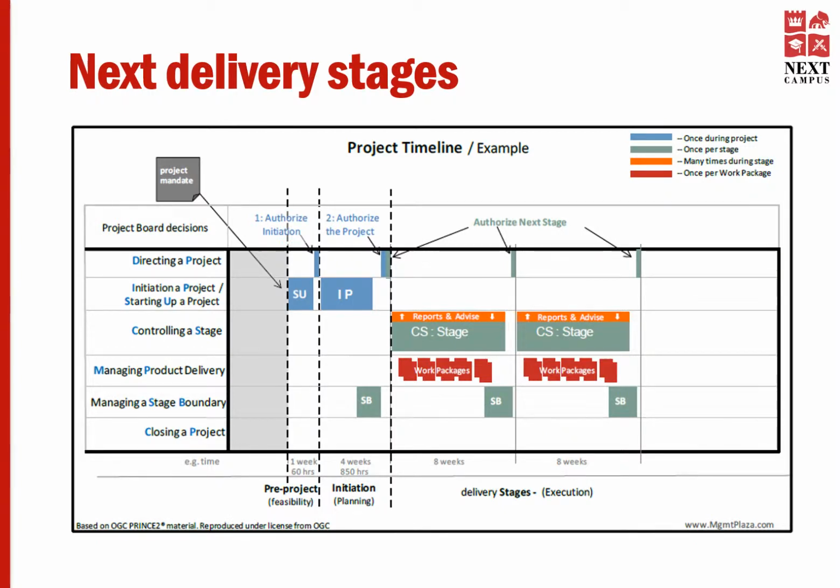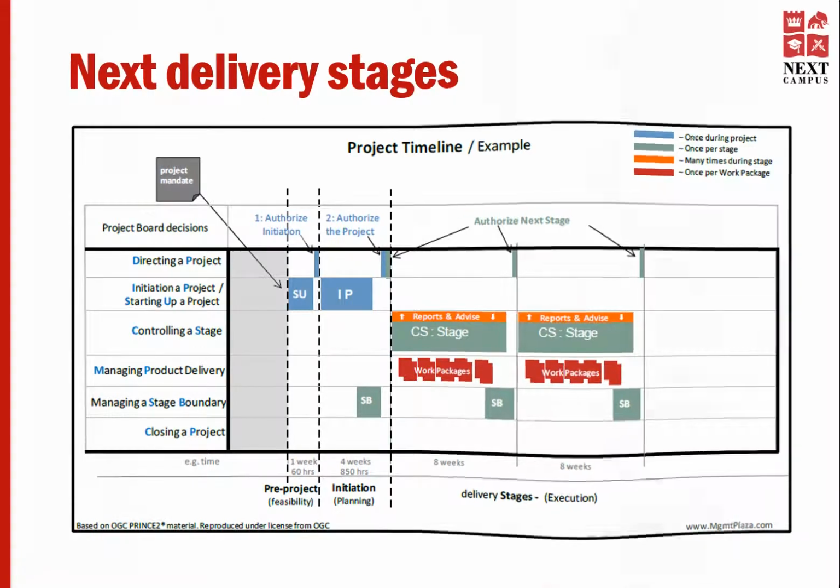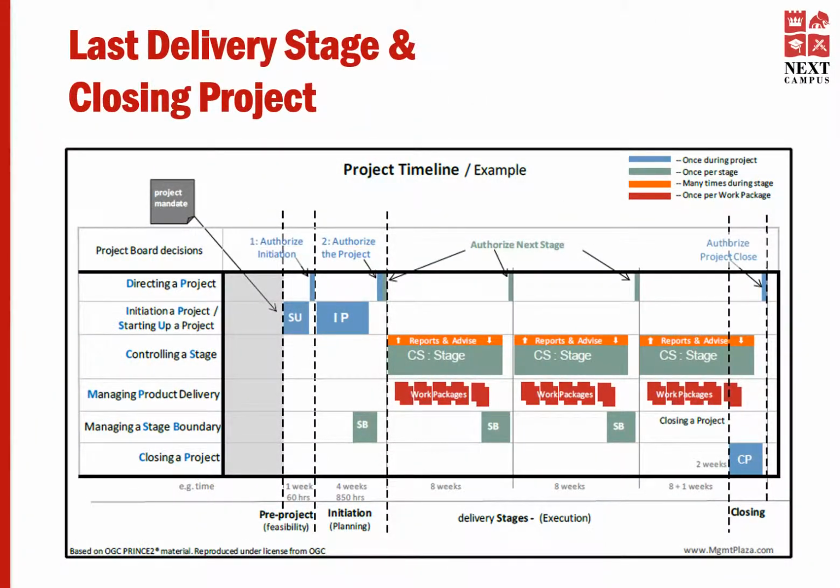Project board decision. The project board will carry out the same activities as described at the end of the last stage. The last delivery stage and closing the project. The project will continue until all delivery stages are completed and it will be closed at the end of the last stage. A good way to remember this is the closing a project process is always the last part of the last stage.